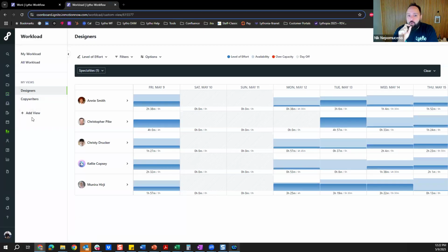I will address that when we're talking about templates because I think it will be a little bit better. But yes, the short answer is yes. When you have a project template where I would do auto date calculations, when I put a project due date on that project, it automatically calculates all the dates for all the work items, and you will skip any weekends and holidays that you have assigned into the system. Perfect.